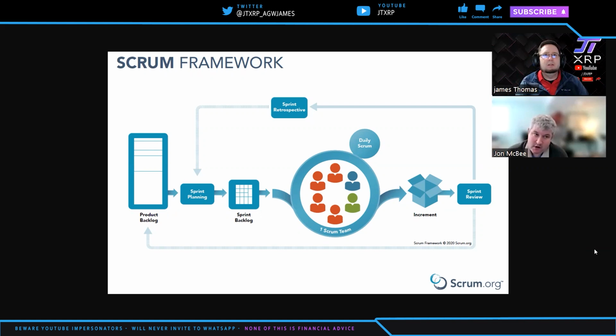One thing that was hard for me to get my head around, coming from running my own small company that was focused on running Scrum, is that now my development team is usually spread across multiple countries, and the communication becomes more difficult because of time zones, or even just because of culture. I find that different cultures will communicate differently with regard to deliverables. Like, yes, I can get that done, or sometimes I can say, this is an interesting idea, but I have to be explicit. I don't want you to do this right now. This can be in the product backlog, but maybe not the sprint backlog. So really being explicit and using this framework to drive where things fall.